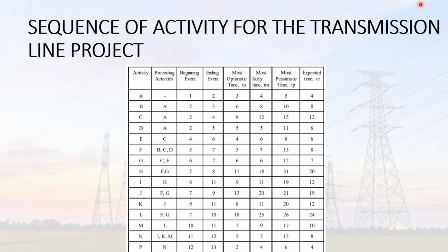Okay, by the data given, we have our activity expected time and our interrelationship. So I have constructed my table. This is my table. By referring to the interrelationship given, I have inserted our predecessors, known as the preceding activities.